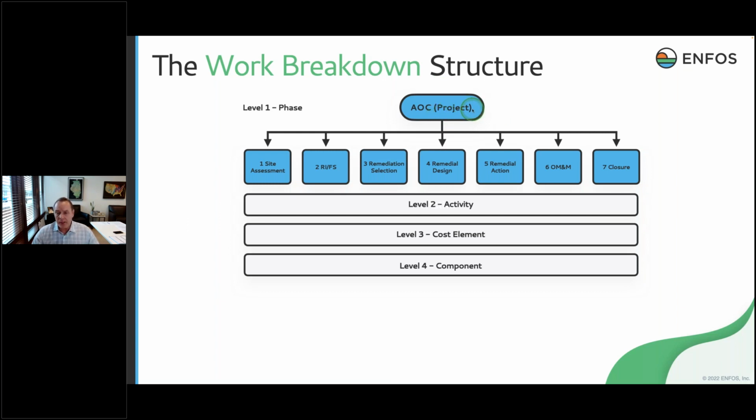So the AOC, when I start looking at now breaking down remediation work, the work breakdown structure, level 1, generally follows the life cycle phases. There are many different work breakdown structure systems available to you. If you're in the Superfund program, you're going to follow a certain work breakdown structure. If you're in a state underground storage tank program, you're going to follow a different structure. But this example here is basically the generalized standard work breakdown structure.